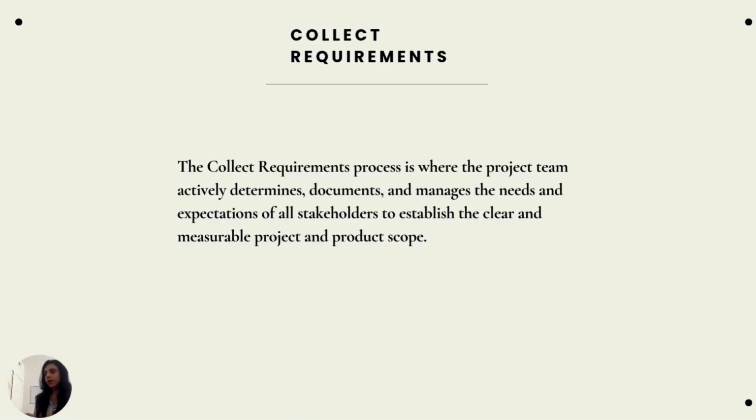But requirement prioritization process, for example, there are different tools you can use for prioritizing the requirements after you collect them. We will also go through it in detail later on, but just to give you a reference of the tools we can use to prioritize the requirements is MoSCoW. It is used in agile methodology. Another one is Kano, 100 pointer method, weighted scoring models, and these are the different types of tools and methodologies which you can utilize along the way.